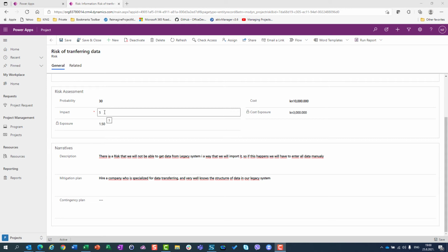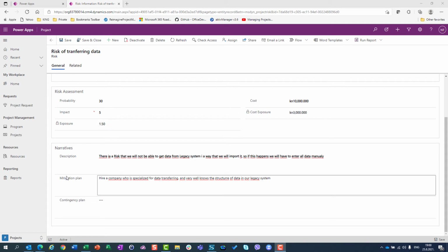Or when the costs of the mitigation plan are higher than the damage if the risk hits you. Let me give you an example. Let's say that you have your garage and you have some things in your garage. Not a car, some old things. And if you want, you can insure your things against stealing.